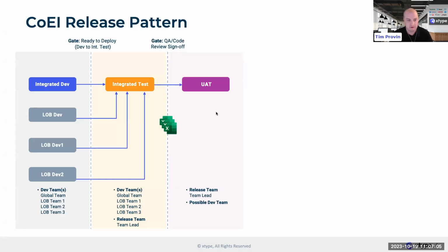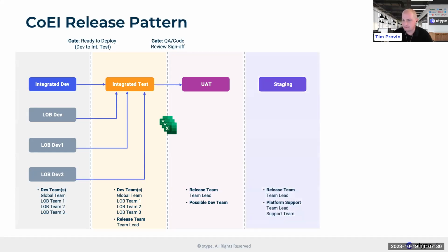So you're moving all of that information from test to UAT through those Excel spreadsheets. Exactly. And that's part of the review sign off that occurs at this point, right? Because effectively, and you can see this by the number of people, the titles or roles of the people we've listed here, you're compiling this list and throwing it over the wall, as it were. Right. You're generally not using your developers to move code into the higher instances and into production, right? You have a release team, a platform owner that's responsible for those things. So your developers have to put together what's the plan and how do I move it?